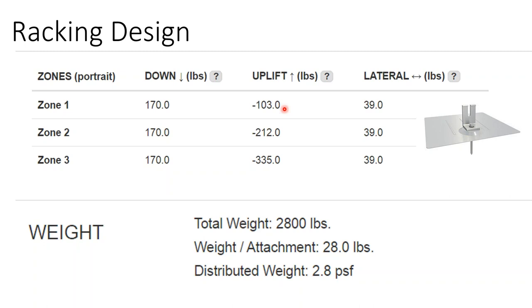But if you're doing any other kind of building, like a metal rooftop or a building where the truss is not 2 foot on center, you really need to plan on going into the decking, even if you're going into the rafters. If you're designing all the way to the edge of the roof and not staying into the interior of the roof, all of those scenarios, I think it's worthwhile to pitch the idea of the engineering stamp.